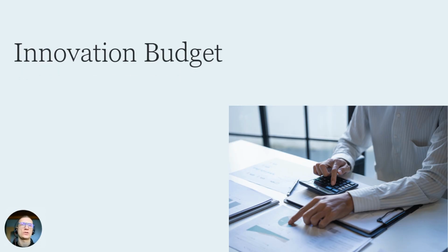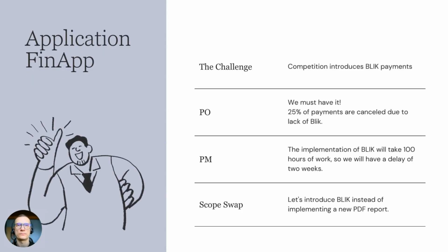And speaking of costs, if we're at the very beginning of the project, it's worth thinking about an innovation budget. If we know we're developing a product or will be, or if we're working in such a dynamic environment, it's worth having such a budget planned so we don't have to choose what to do instead of what in the project, but so that we can do something extra. And then if it turns out during the project that there's a feature we didn't think of at the start and customers say they want it, we can deliver that feature to them.